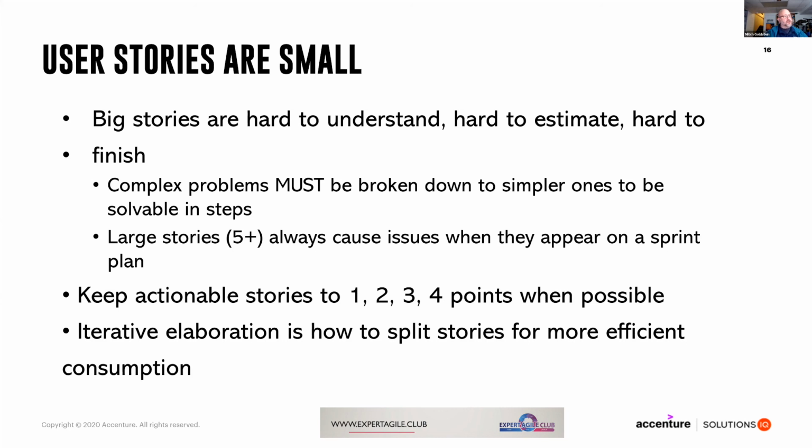And that's because if you're using the pure estimation scheme that's recommended by SAFe, a 5-point story segment takes more than half a sprint to complete. And if that's the case, then the likelihood of you completing that is very, very low if you don't get that story done in the first couple days of a sprint.